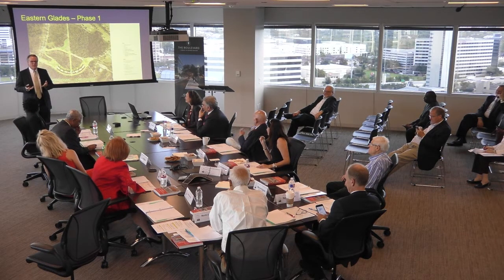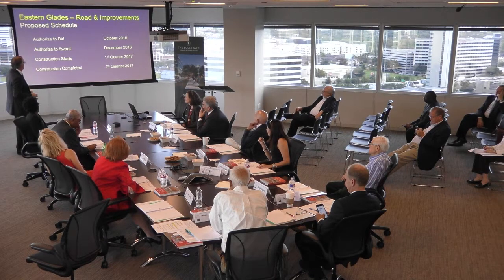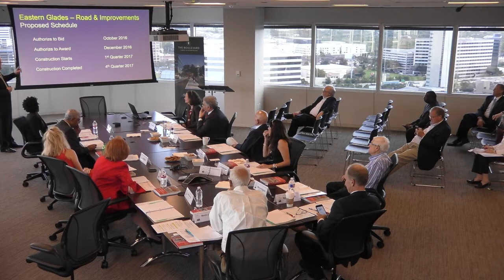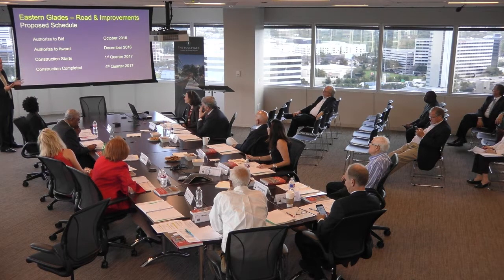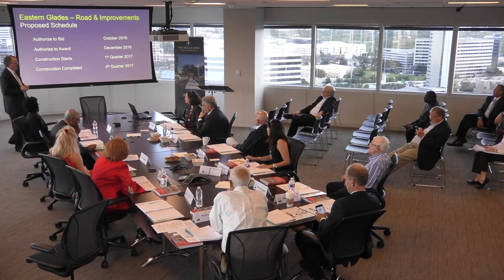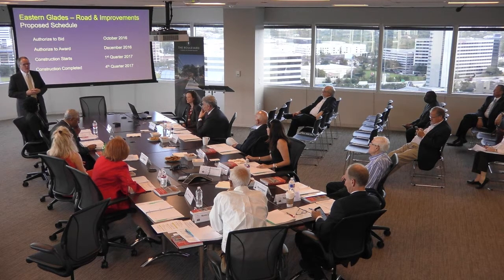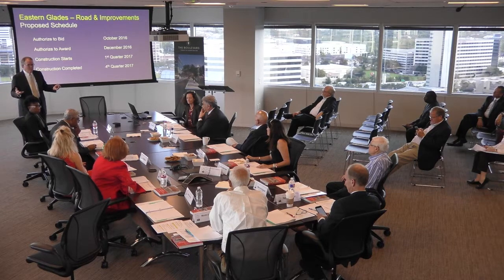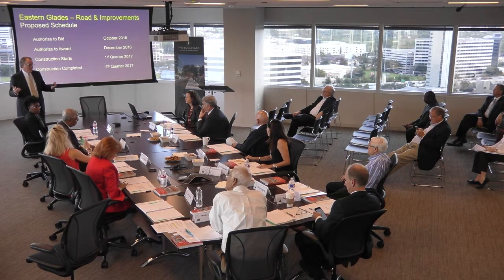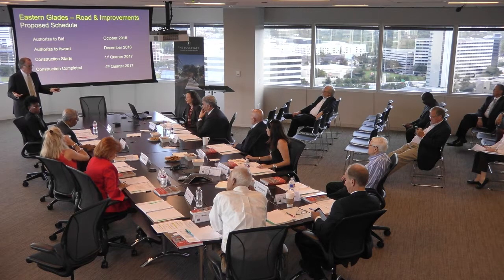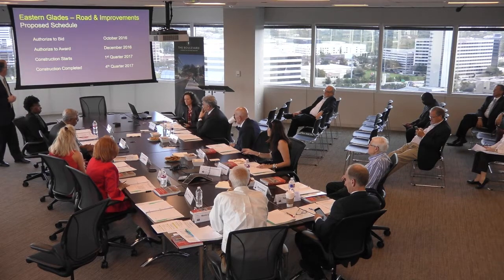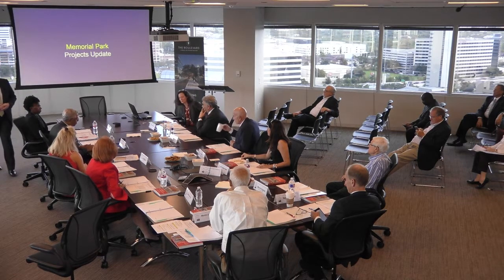So what we're asking for authority today is to go out and seek bids, and then bring that back to you, most likely in December, that we would see construction starting, notice to proceed in the first quarter of next year. By that time, all the agreements will be done. I think all the agreements can be done in the next 14 days probably. I think the agreements will be done before Thanksgiving, before you're asked to award.